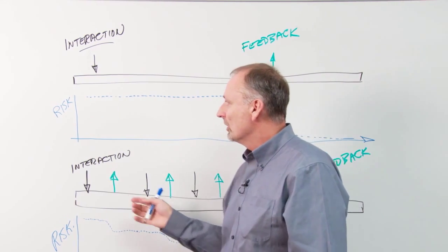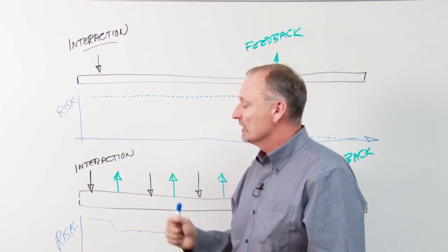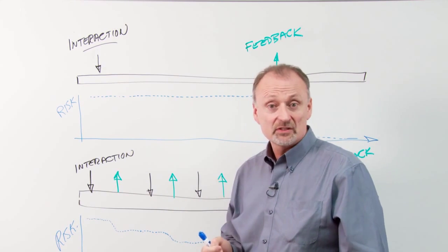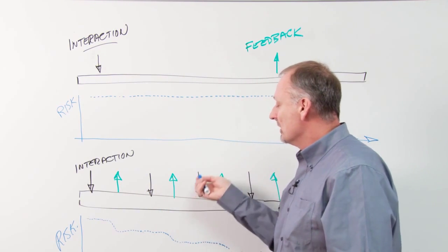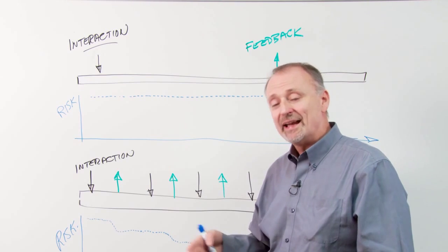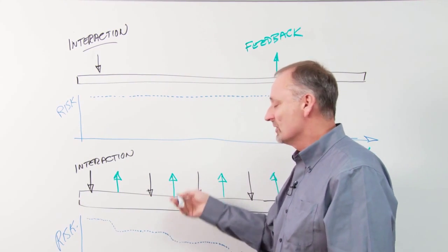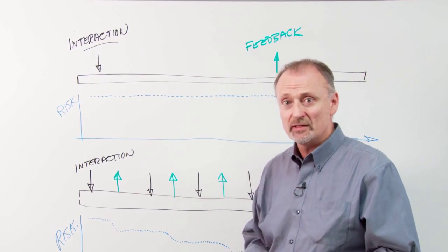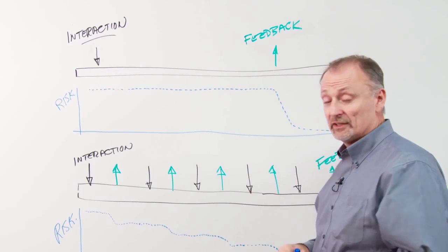So in an Agile approach, and again I'm generalizing, we have the initial interactions and elicitations with the business client, with the end users, and we provide those feedback moments much earlier in the process, so it's early and often. In other words, we're building slices or pieces of the system that we can actually demonstrate back to get those aha moments, as I call them, early and often.